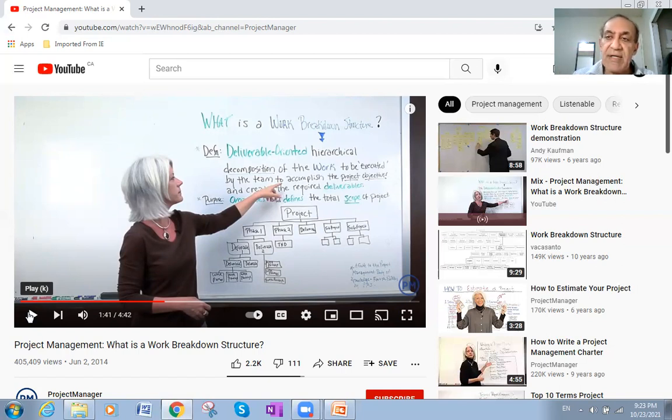Again, I'm saying in the work breakdown structure, the chronological order to be practiced or processed is not very important. We don't care so much. We care about this in the scheduling, which phase will start and which phase will come next, that we care about in the scheduling phase.